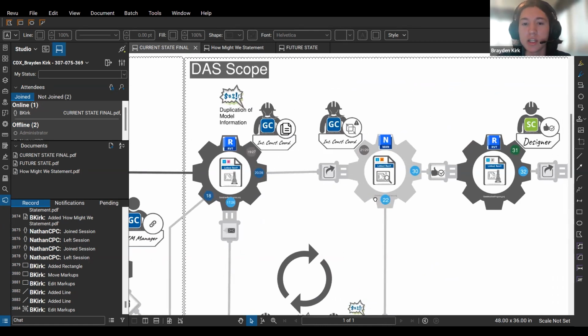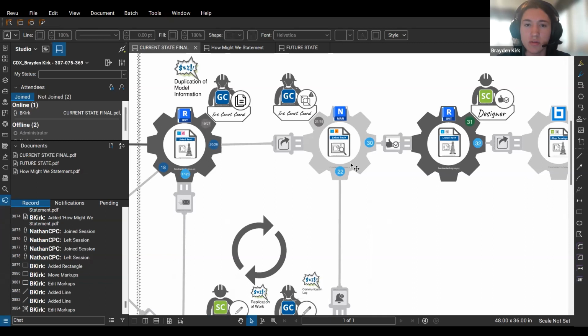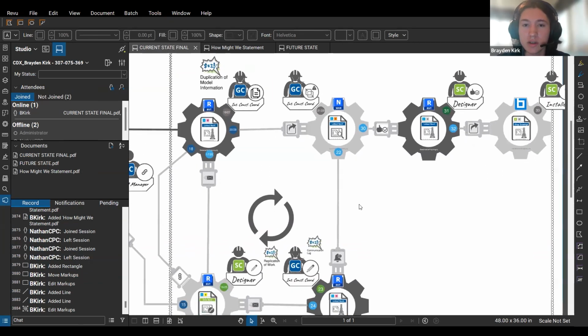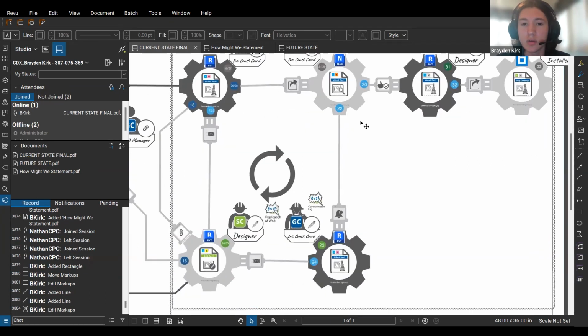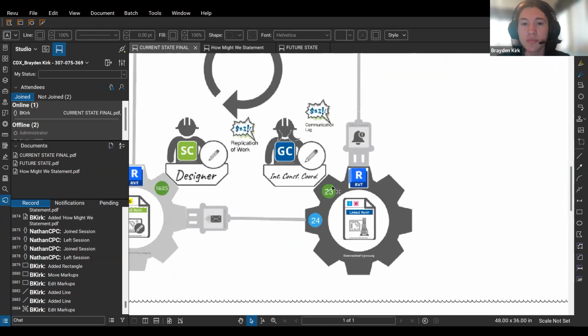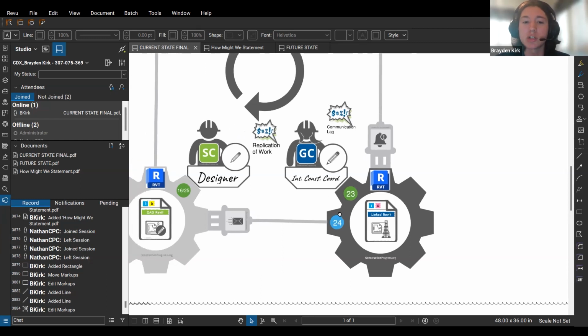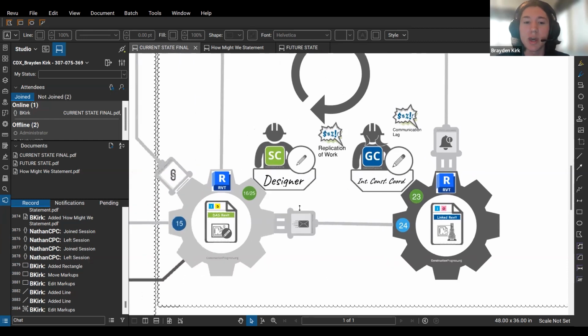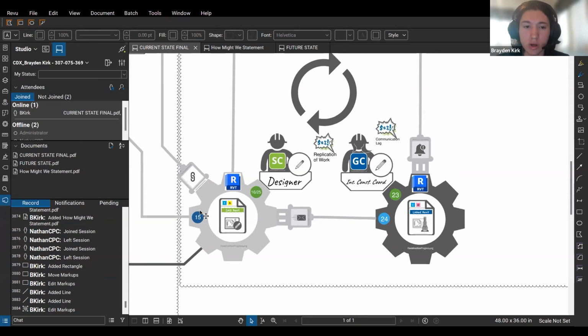But that would kind of lead into the Navisworks coordination effort, figuring out if everything fits and works together nicely, which would then feed down to where Mortensen in this case would go ahead and actually make edits and suggestions to the design to better implement the integration of other MEP systems, architectural information, and such, making those changes, which they would then notify Henderson via email again to update their linked file and get ready for approval essentially of those changes.